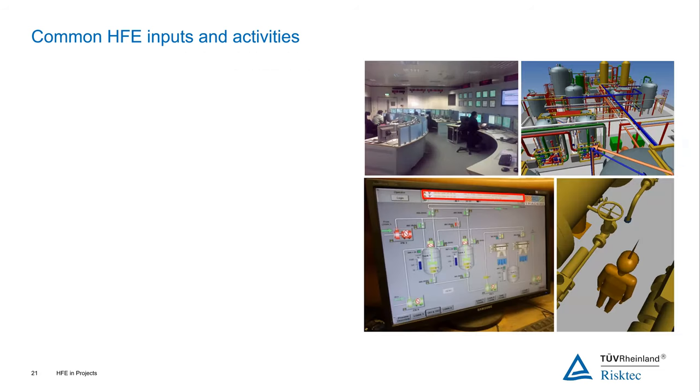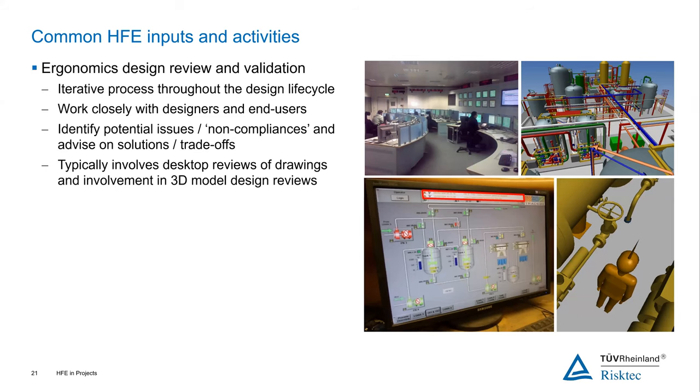So the most common input for this type of project would be input to design reviews and validations of the design as it progresses. That's an iterative process throughout the design life cycle. And HFE specialists would work closely with the designers and the end users of the equipment. In these design reviews, the aim is to identify potential issues or any non-compliances against the specified requirements and help advise on solutions and trade-offs.